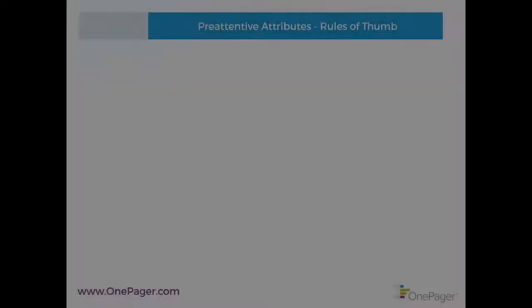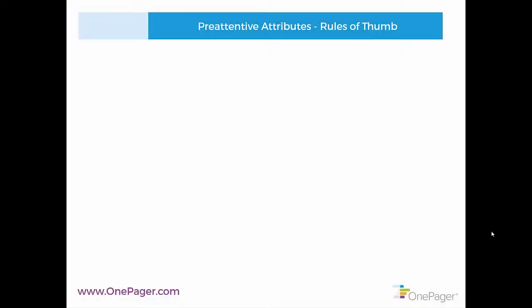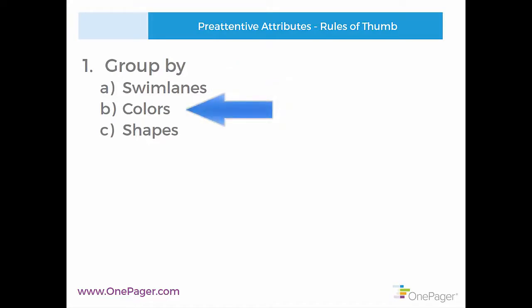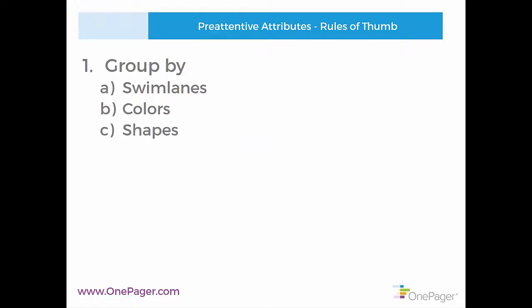Some rules of thumb that we use are, don't attempt to subgroup things beyond the swim lanes and secondarily with color. If you need a third dimension, use different shapes. All of these are something you can automate using swim lane grouping or conditional formatting in OnePager. We have separate videos for each of those in our support portal.